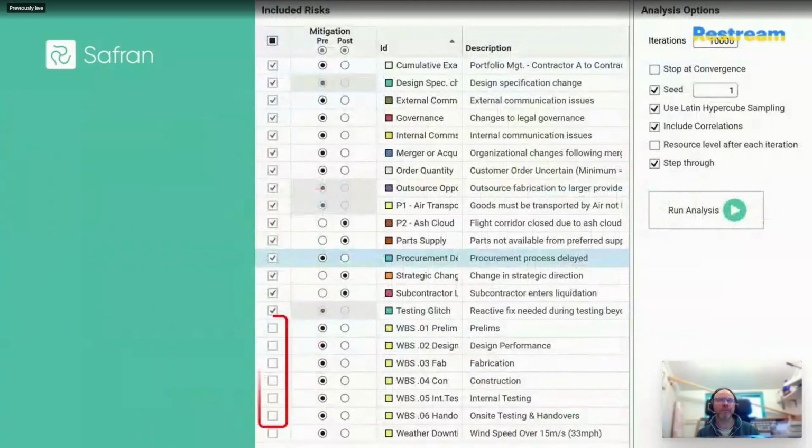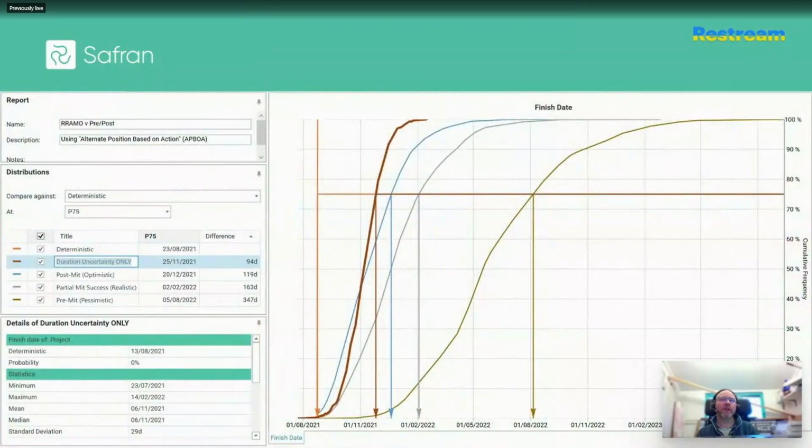So it's good too. But getting back to one of the main advantages of using Safran's risk driver method as compared to the legacy method of uniquely articulating a risk range for each individual activity within the schedule, this method available in Safran allows you to turn off one or more of your estimating uncertainties with ease, learning how each of those risk drivers affects the model outcomes by memorizing the results into your distribution comparison database, which of course is where you typically compare the effectiveness of various different states of your risk model from fully to partially mitigated as required.